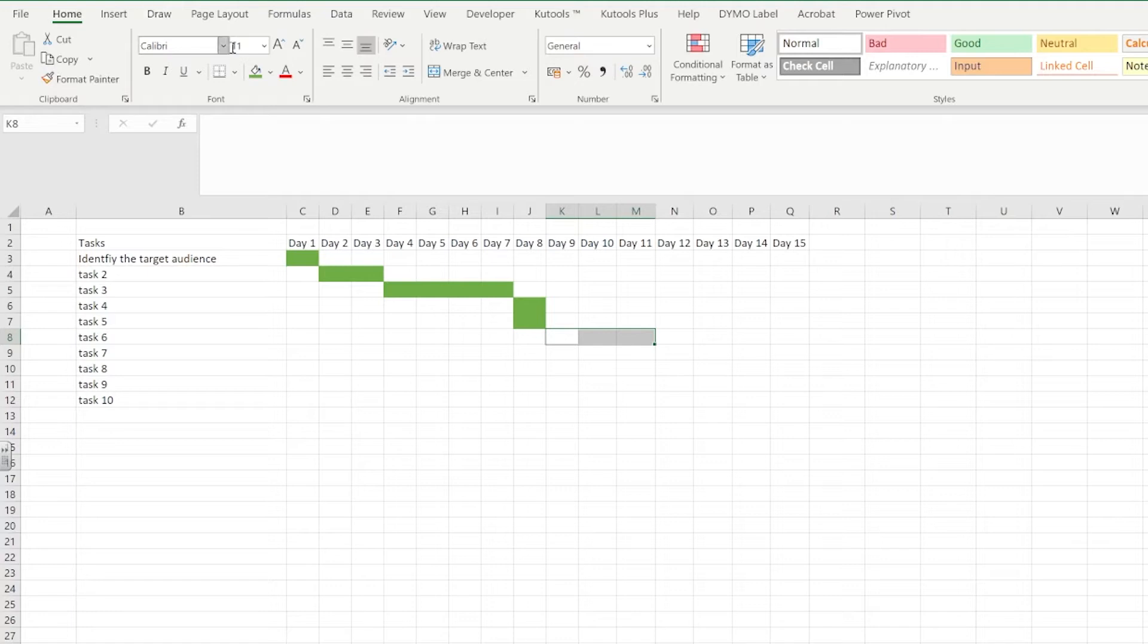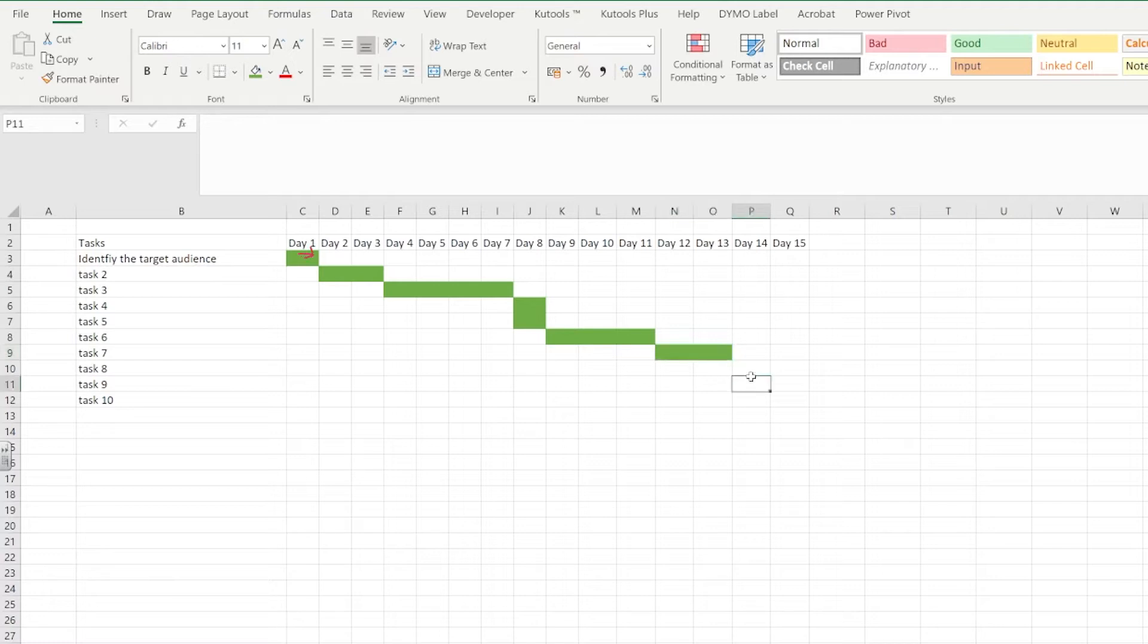If you notice, I can't start task two until task one has finished. So you can see that there is a slight drop in the line so that you can see that it cannot begin until one has finished.